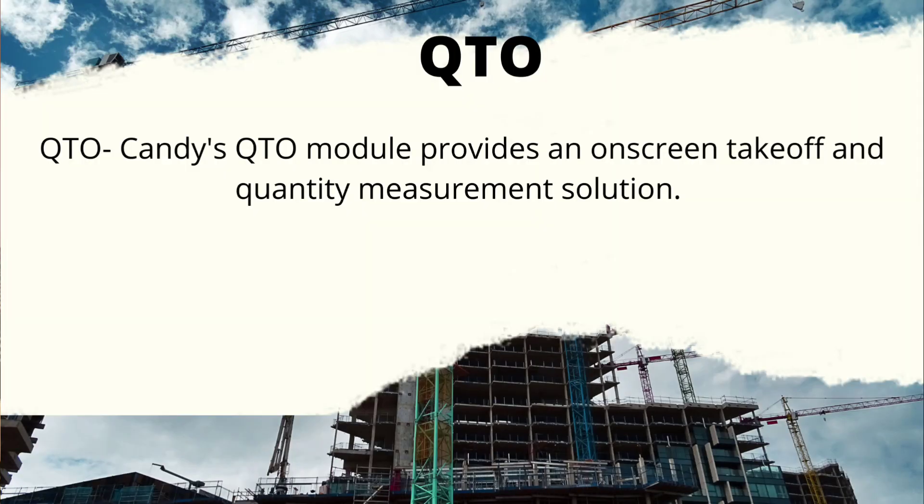Next is QTO. QTO is actually linked to Candy, which is the first software I started with. Candy QTO stands for Quantity Take Off, and it provides an on-screen takeoff and quantity measurement solution — similar to DimX. It is an on-screen measuring tool where you can link it to your BOQ and measure directly onto it. As soon as you have Candy, you have free access to QTO where you upload your drawings, measure from them, and link it to your BOQ to make it a wholesome system. There are some limitations — for example, not everyone can measure the same drawing at the same time, whereas with DimX multiple people can measure the same drawing simultaneously.